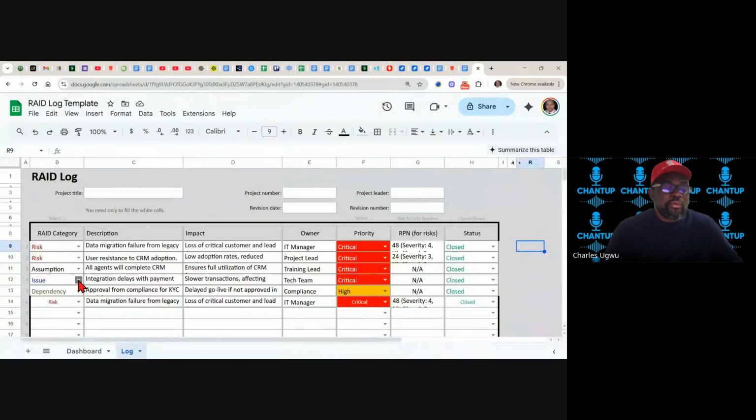It has happened. That is how it has happened. So it becomes an issue. All you need to do at this point is start pushing for extension of time. That is the only thing that can be a mitigation strategy for this particular issue.